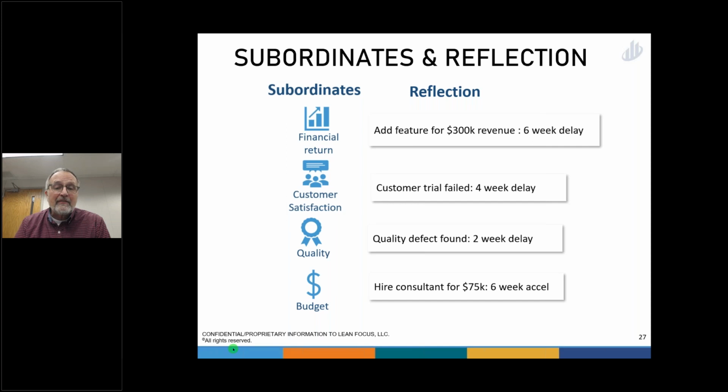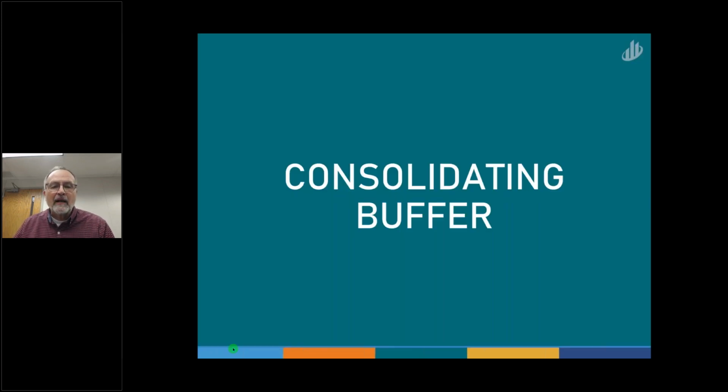Quality, we found defects and we've got to go back and fix them. Or I need to hire a consultant. I'm running behind. If you'll let me hire this consultant for only $75,000, we can pick up 6 weeks. It's so much more powerful than saying, I need a consultant, I'm too busy. You've reflected it into the bottleneck constraint.